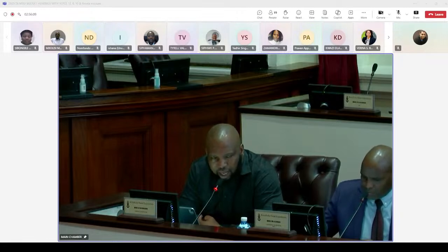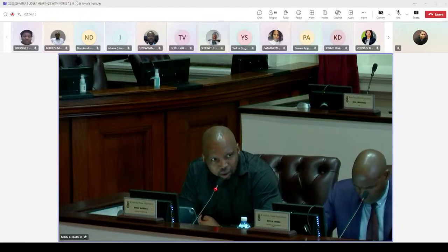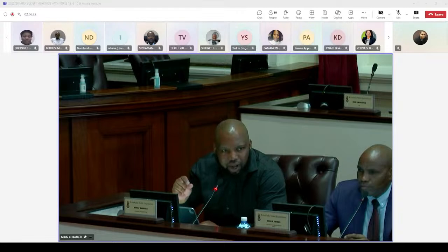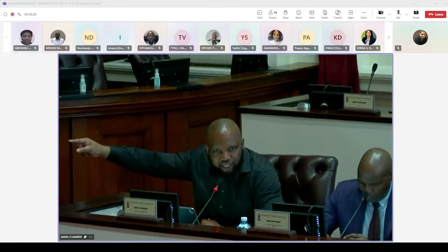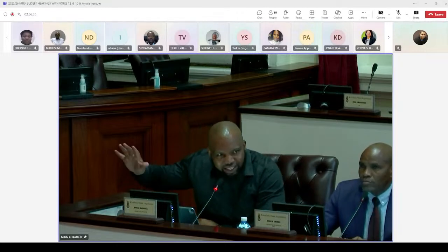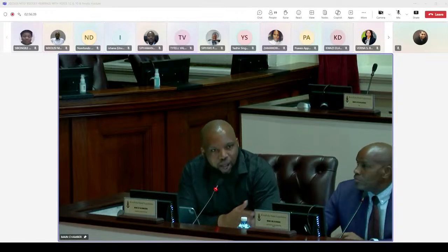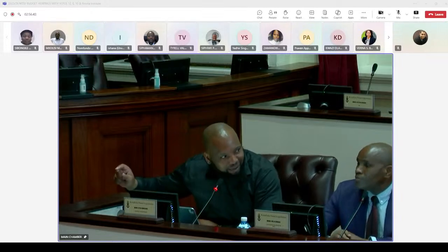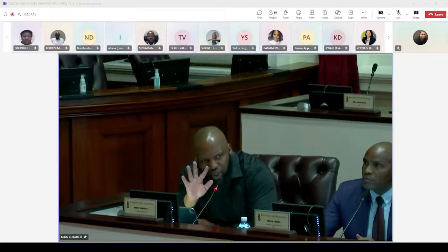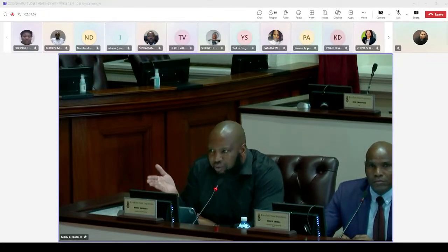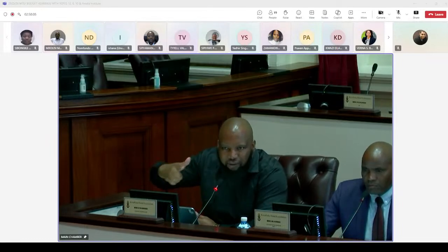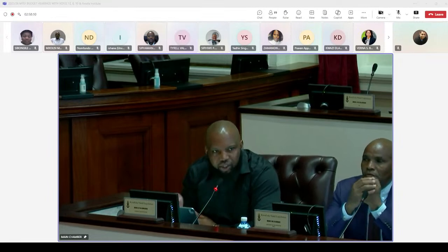I must also highlight, Chair, the cycle of the Department of Human Settlements. At face value, you'll think that it is easy to chop and change. In our structure, the project that is going to be implemented in 2027-28 is in the business plan phase as we speak. We are designing, doing EIAs and all those things. In fact, we have recently decided that we are no longer going to process a business plan if there is no money, because if you go to a certain area and announce it, stakeholders will say you've committed to this. It is very tedious to understand, because we hope that some of the targets will only be met if CPI does not affect us or if there is more collection from Treasury. That is why we do some of these things.